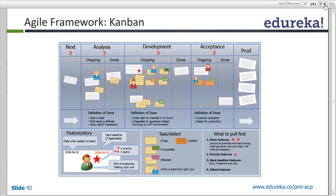Initially, all tasks start in the not started column. When I pick feature one and two and the team starts working on them, those sticky notes move from not started to in progress. Feature one and two will only move to done once testing is complete, defects have been closed, and there are no pending open issues against them. Until then, they remain in progress.